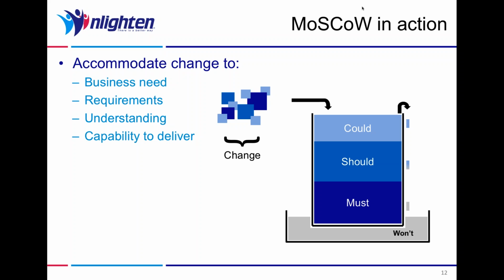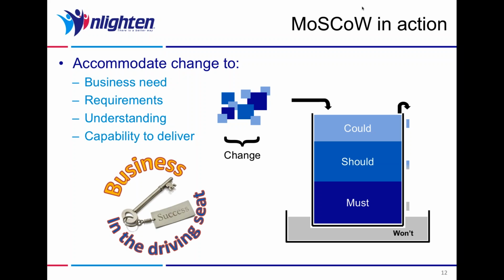Okay, so what we've done then is we've added a new should-have requirement. It's not a must-have, which is what he first thought. He acknowledges now that it's not a must-have because there would be workarounds. It is, however, important enough to be a should, and that's where we slotted it into the stack. And we did deal with it in due course. It got delivered. Everybody was happy.